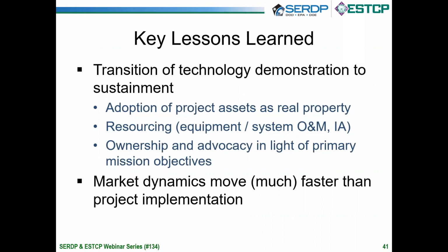And another big challenge in these military microgrids is leadership turnover. In the military, every 2 to 3 years, leadership will turn over. And at this installation, they're very much focused on the mission, as I'm sure they are at all installations. During this project, we had started off with very strong leadership on the government side from the sponsor, who was deputy base civil engineer, and then he ended up getting a job in the private sector. So reacquainting folks on the installation with the project and reselling the value of the project was an ongoing thing as personnel turnover occurred.